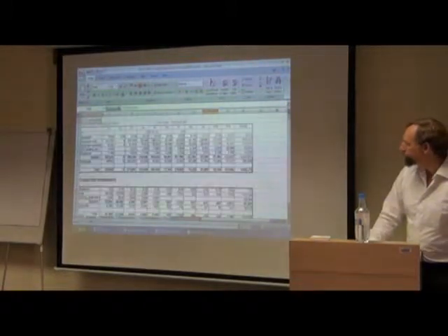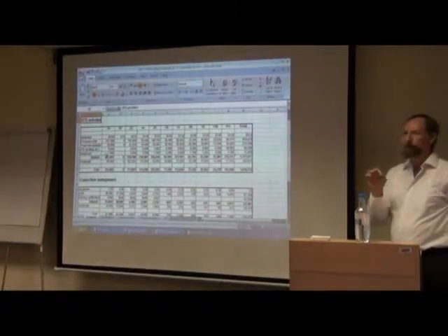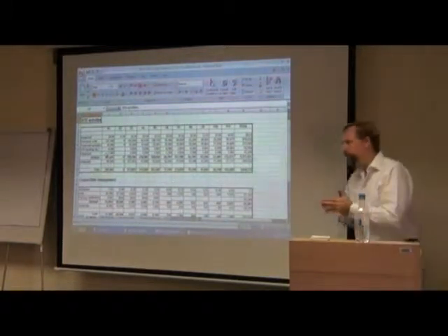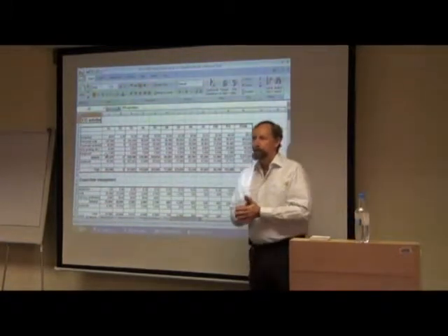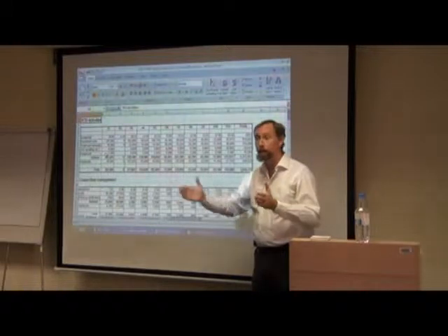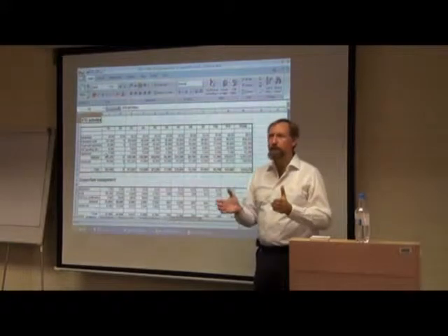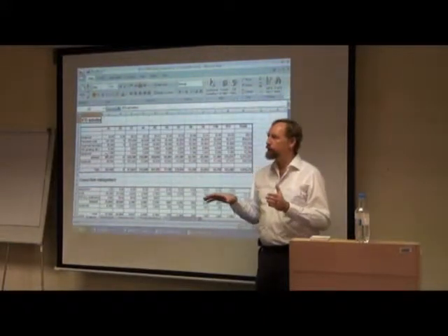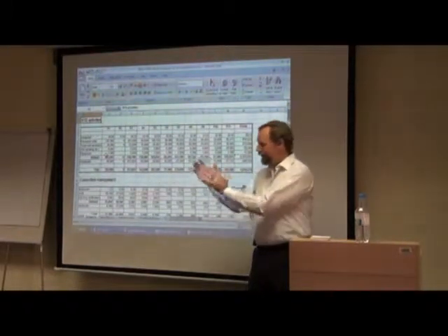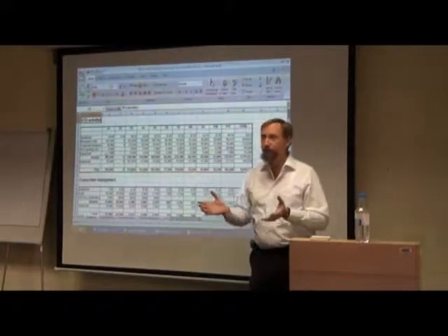And then finally, with equipment, you need to pay attention. I am sure all of you know, equipment needs to be depreciated. So if you buy, for example, a computer, many universities have the internal rule that computer equipment is depreciated, spread out over 3 years. So you buy the computer for 2,000 euro, you have 660 euros each year that you actually use it in the project. That means if you buy the computer in the 3rd year, you can use only 1 year of the depreciation. And the other 2 years are outside the scope of the project.